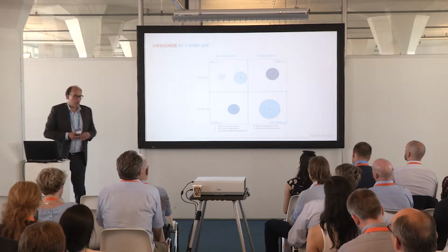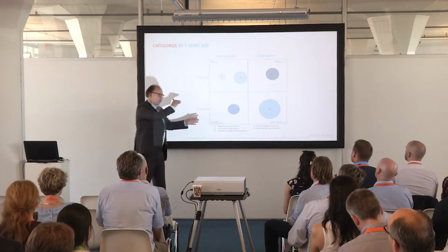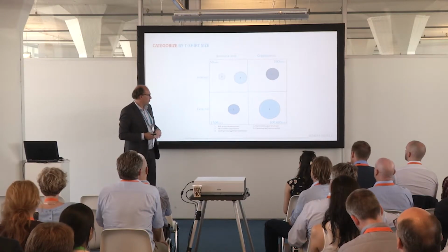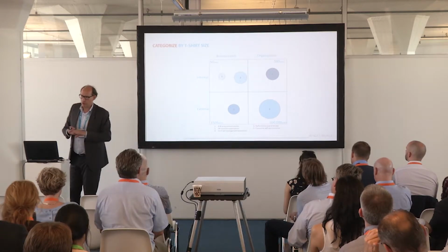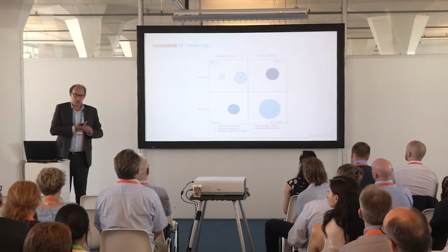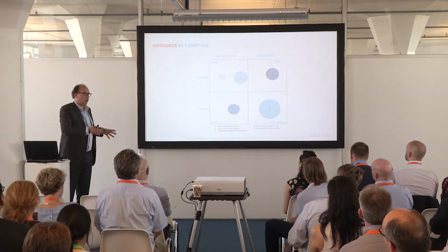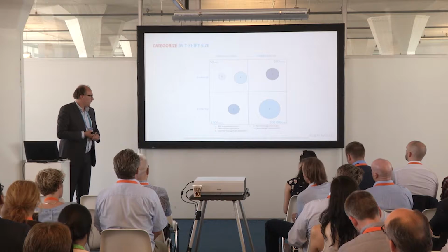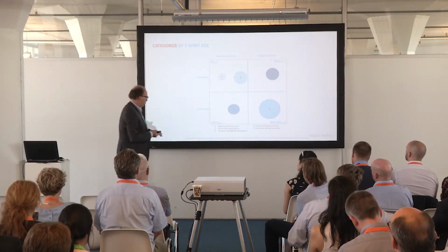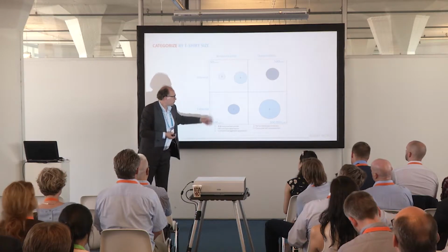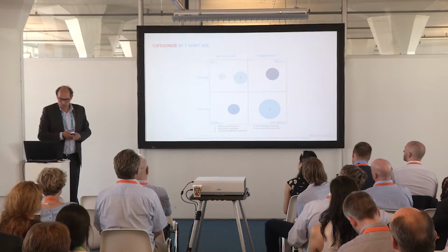What you can then do is you can start mapping these different applications. As you've seen, the grid has changed, but the idea is still the same. What you want to do is look at the different applications that you've identified, how complex they are, how big they can potentially be, what the potential value of these specific applications is, and then map them on this complexity grid. And based on that, you can define specific applications and use these applications to define your roadmap with.